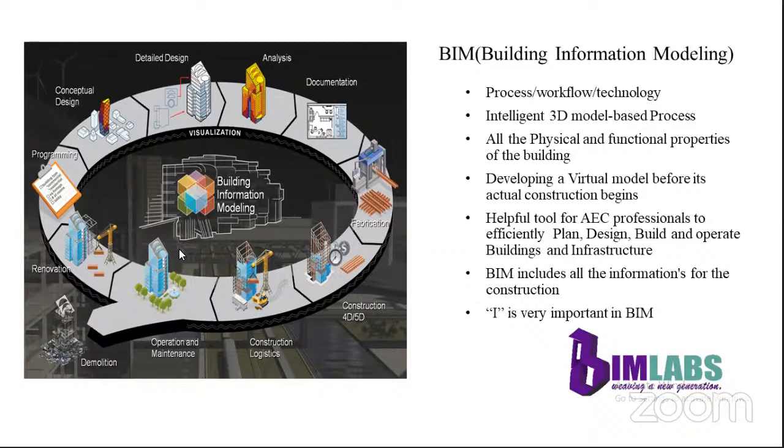So mainly there are 5 types of detailed modeling. One is architectural, then structural modeling, then mechanical modeling, then electrical, and then plumbing models. All these models have to be created by the corresponding engineers, like architect, structural, mechanical, etc. Once the architectural drawing is completed, it has to be passed to the structural engineers so they can place structural elements like columns, beams, all those things, using the architectural model as a base. Only then will they finalize the structural model, and only after the structural analysis.